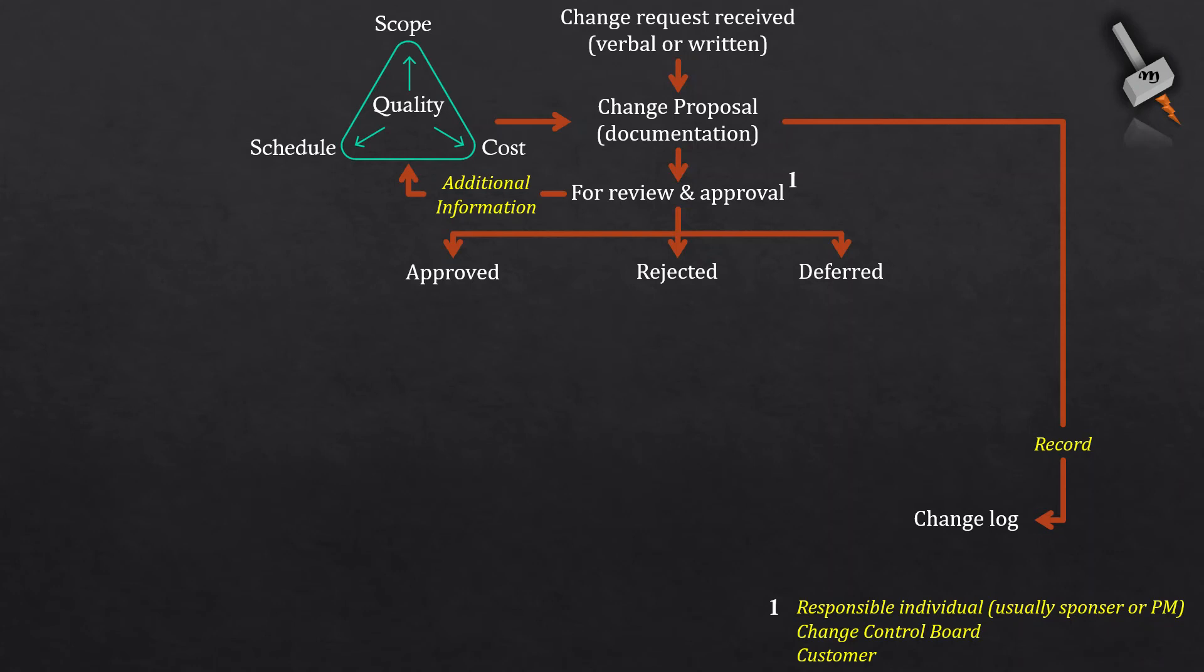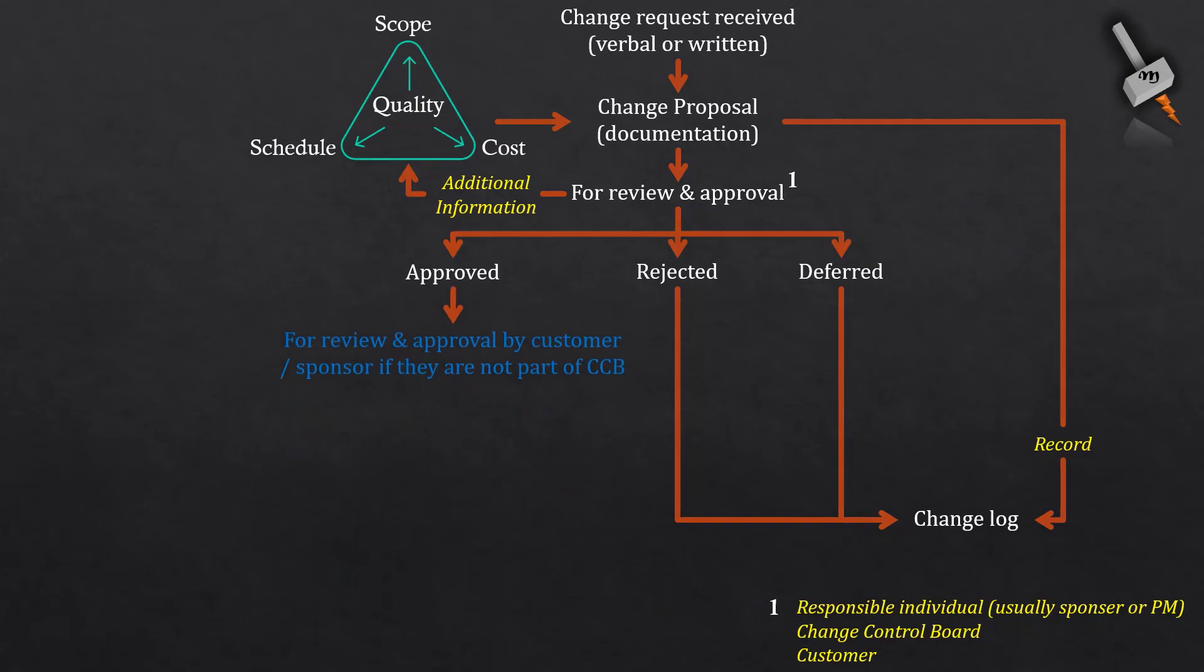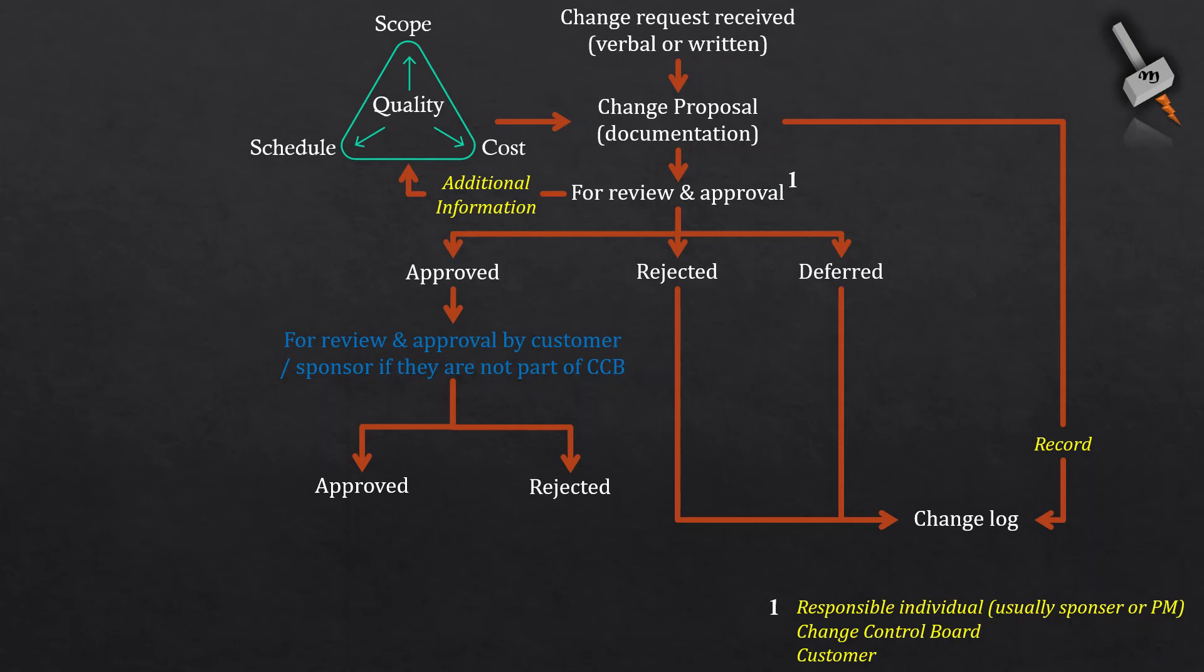Whatever might be the outcome, the project manager updates the change log as a part of it. In case customer is not a part of the review committee, then the change request after approval from the change control board goes to the customer. Customer can either accept the change or reject the change. Once the response from customer is received, the change log is updated.